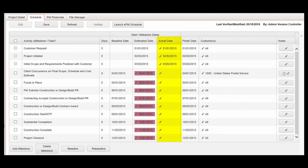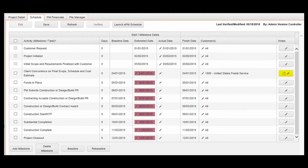Enter actual dates for each milestone as they are completed. If the project has multiple customers and the milestone only impacts one of those customers, select the appropriate customer from the list next to that milestone. To add notes about a milestone, click on the pencil icon to the right of that milestone, then enter notes and click OK.